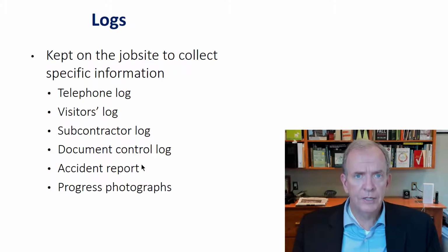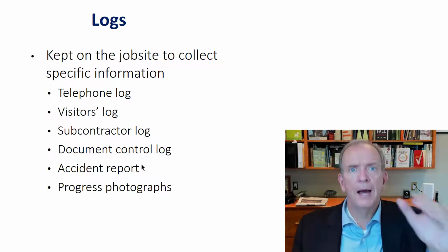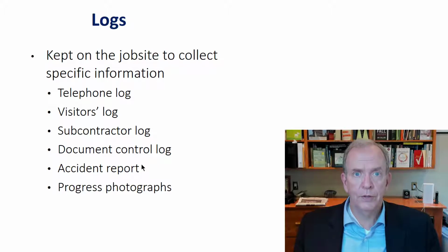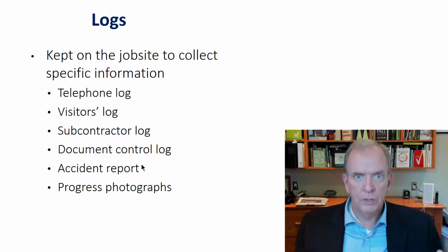And again, with the productivity software that's being used, you can upload your photos instantaneously, like Instagram, and then it's in the system. It's date stamped as to when it happened, and that's really helpful. So if there's a discrepancy with the schedule and the client's not buying your time frames, you would have that photo log to back it up and say, no, we poured the concrete for that slab on this date. There's the pictures of the truck doing it. There's the pictures of the slab going in. They're date stamped. Voila. Really good documentation and evidence. Not that things can't be manipulated digitally, don't get me wrong, but that's a good start.